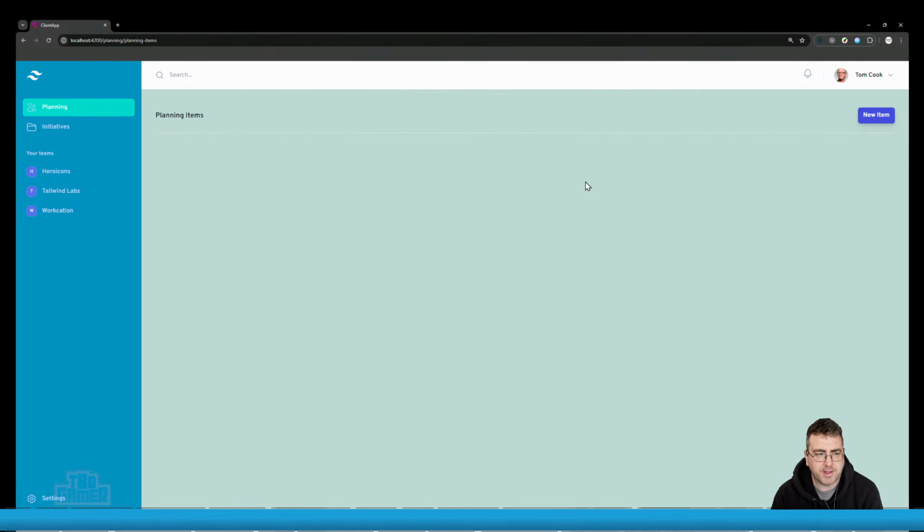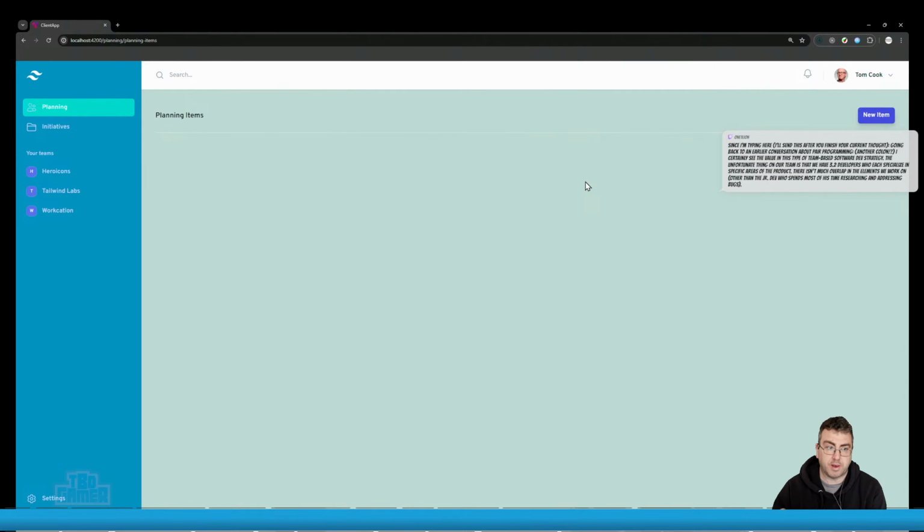And it's why I feel that UI, especially if you're building an API that is quite involved in itself, you should never put the UI and the API stories together. UI can be mocked, UI should be mocked, and it's possible to do. So some people were kind of like, oh, well, I want to do the entire slice, right? I want to do the UI with the API, with the database all in one go. But if you think about the sheer amount of work I've just put into what I'm doing, that's a lot of work.